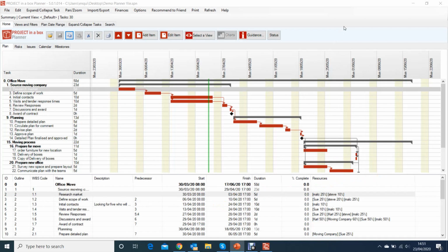So here's my planner file. I'm going to look at 2 or 3 different example files as we go through this session. The first one here is helpful in talking about calendar and non-working time. So the model within Planner which decides when tasks start and finish is dependent upon dependencies, but also task durations, the amount of hours or days or weeks or months we think it's going to take to complete a particular task. So we'll know the start date. It'll either start on a particular date or following the completion of another task, perhaps with a lag, and it'll run for a certain amount of time.